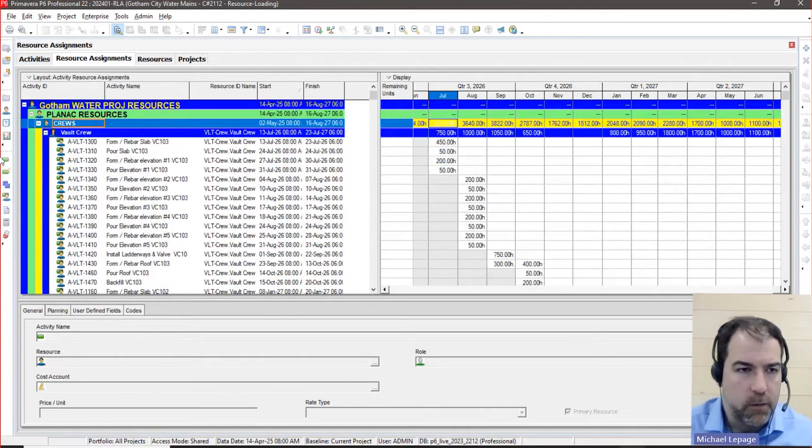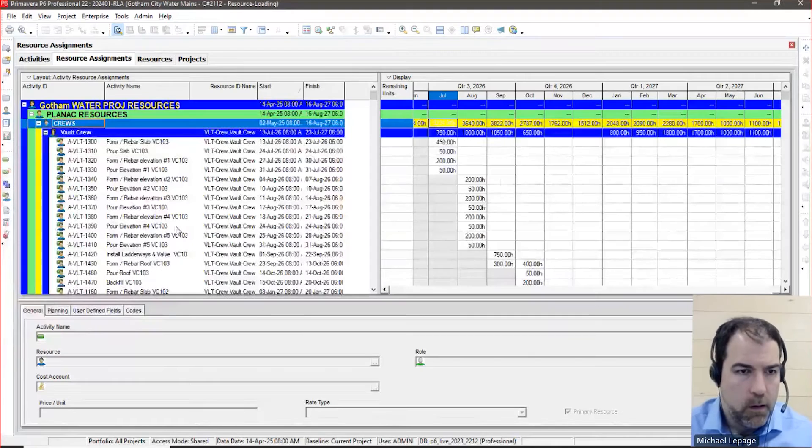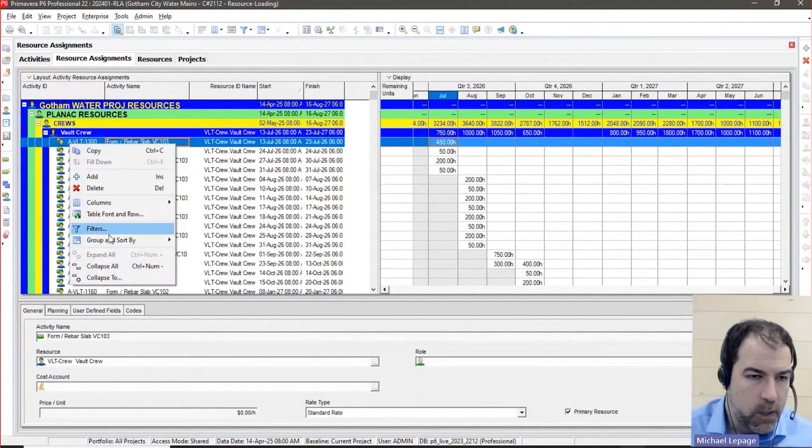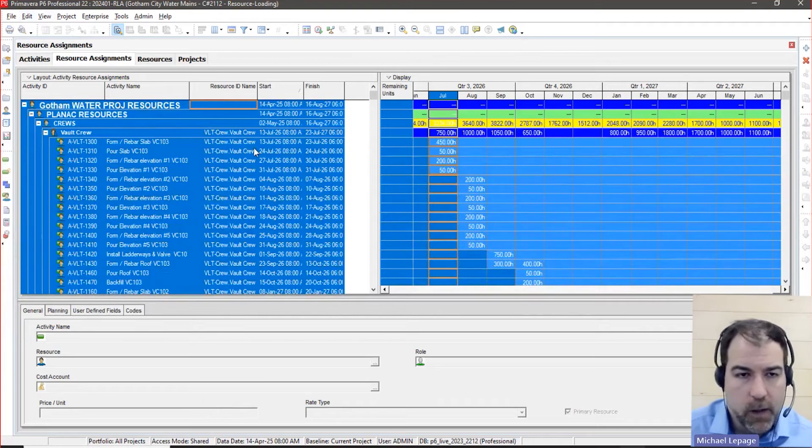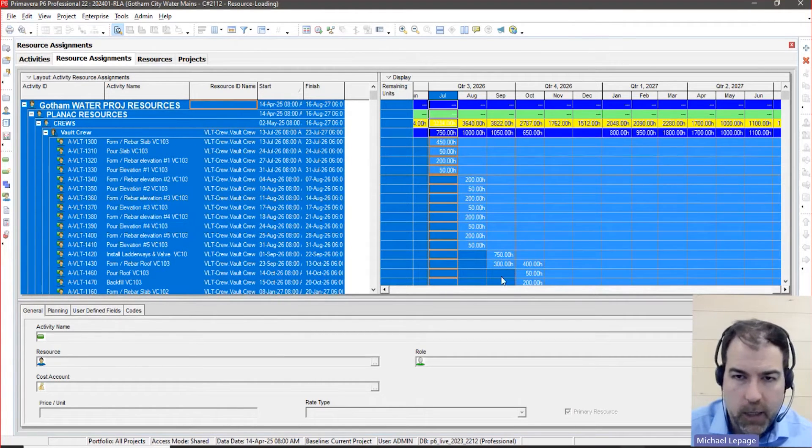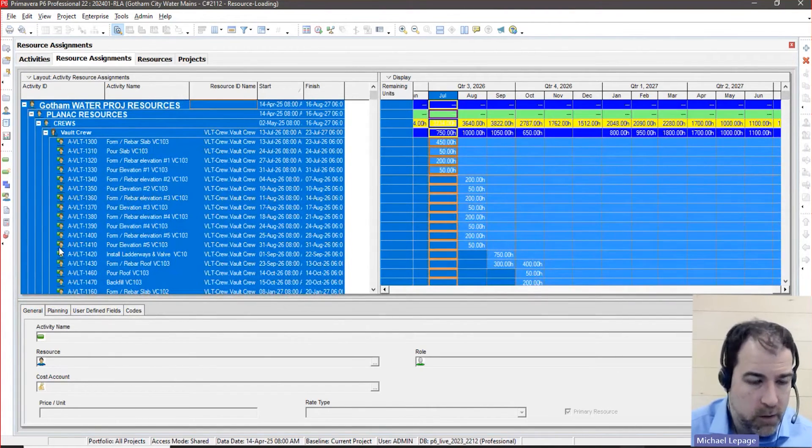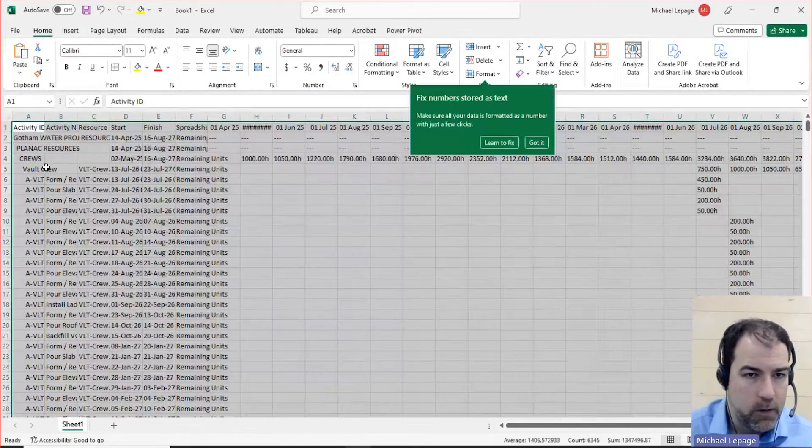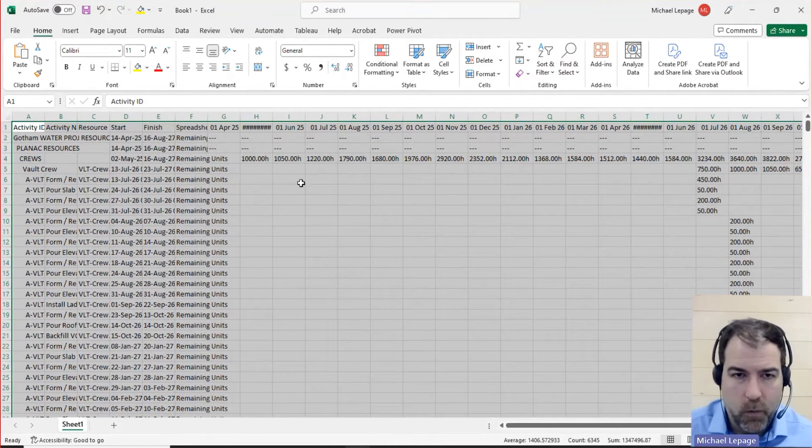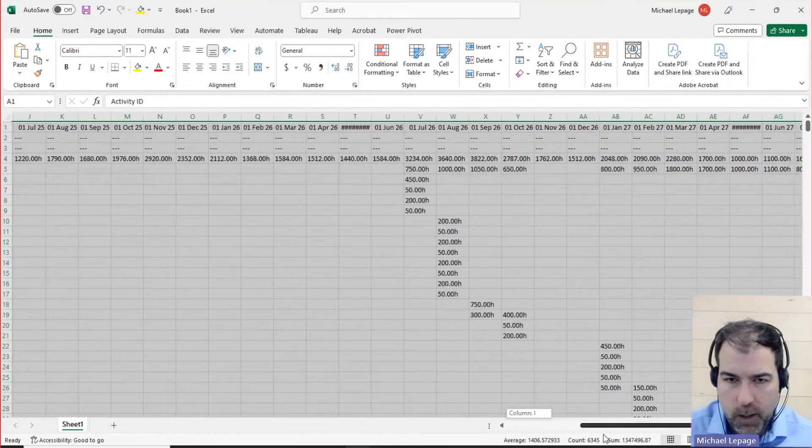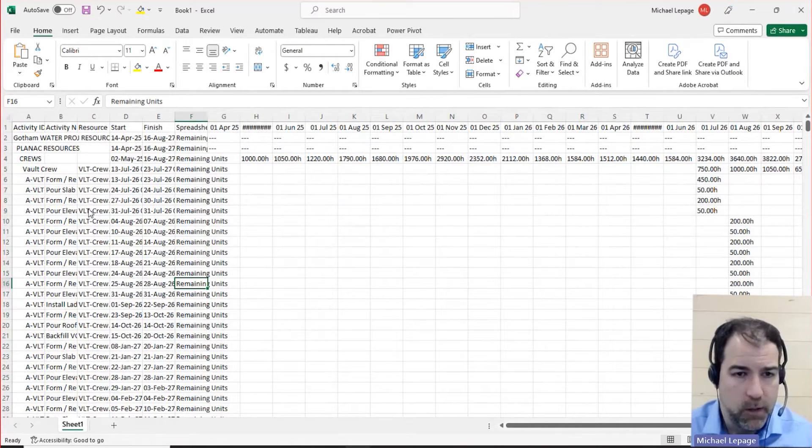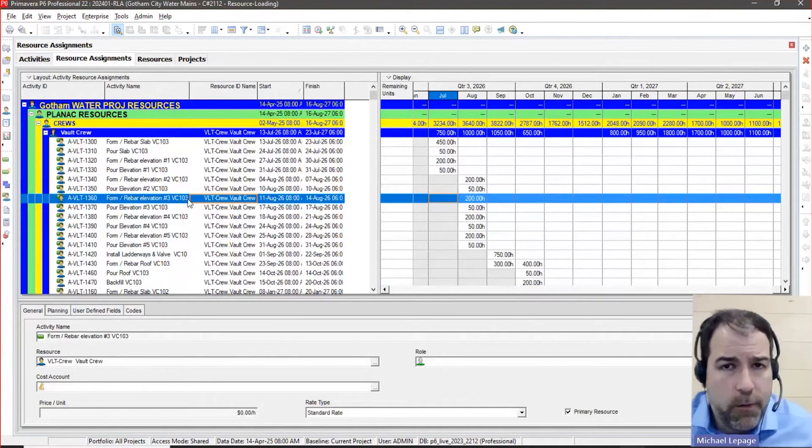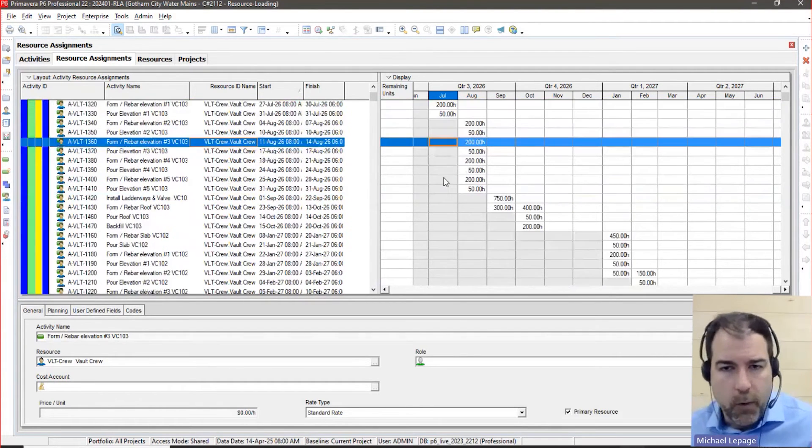How do I get this stuff into Excel? This is one of the questions that comes up. Let me load up Excel here first. This is weird, but this works. You right click and do like select all. Maybe it's on the edit menu, select all, just copy everything. Notice when I do select all, it copies this data and it copies this data over here. It just highlights everything. And you just control C and you can come over here and control paste it, control V, paste it. Now it's formatted a little bit wonkily. You're going to spend some time mucking around with the formatting and whatnot. This is a quick way to get the data out of P6 into Excel for graphing or further analysis. If you want to use some pivot charts, pivot graphs, all that kind of stuff, you can do it really easily that way.